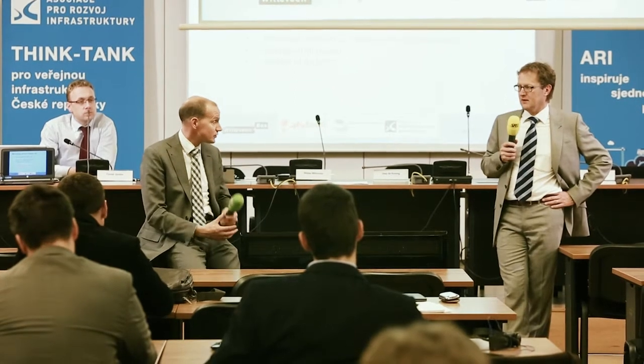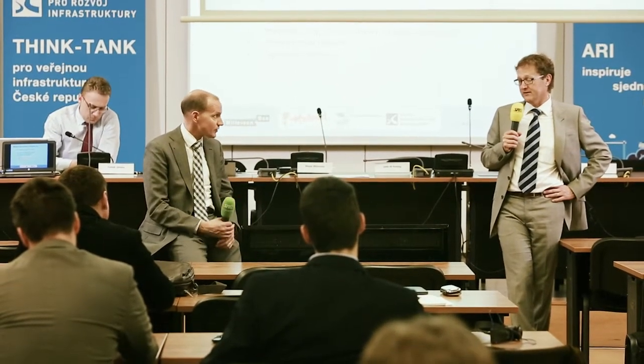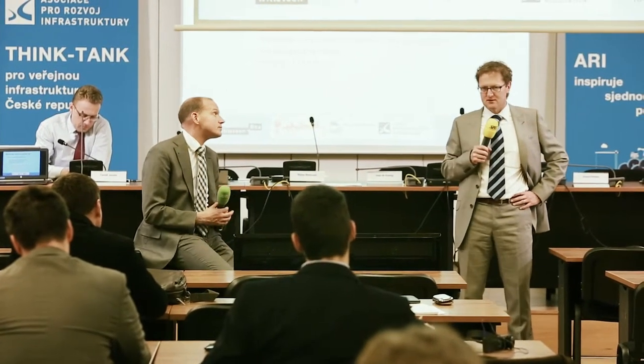Yeah, my experience as well. If it's less than 50%, then quality is not enough. Price becomes dominant. Yeah, price becomes dominant.